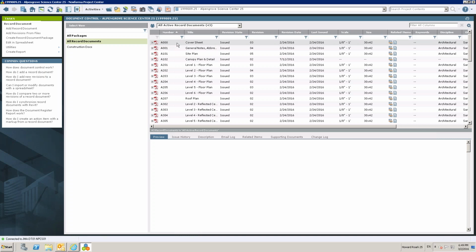In this instance, we haven't created a Newformer document set, so some of them might be issue 4 or whatever, but because we've just started the job, do we have to create a document set and create those issue numbers, or can we just make the documents all available? If you just want them to become available on your mobile app, you're always going to have to issue them from document control, and there are a few ways we could go through that. You'd want to have them all as individual PDFs, because that's what enables them to be viewed on the mobile apps.